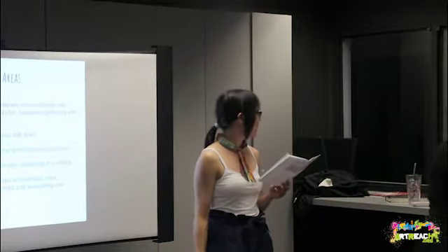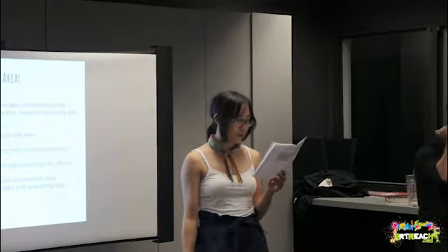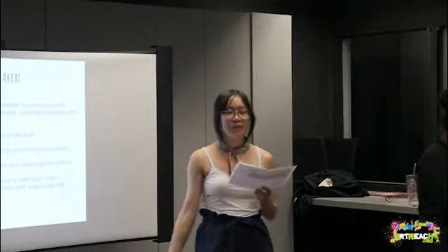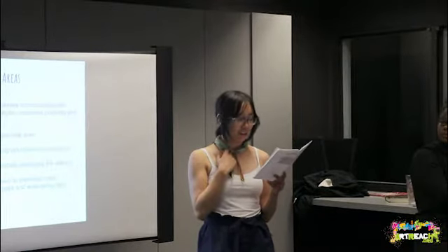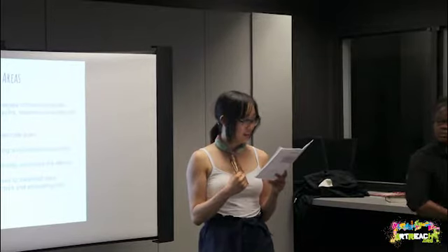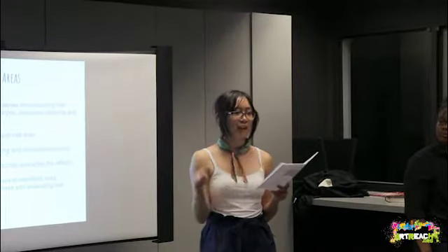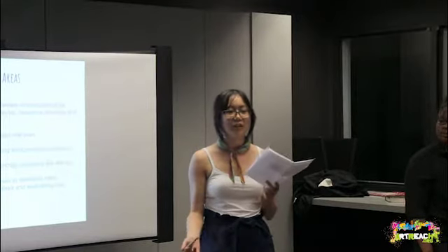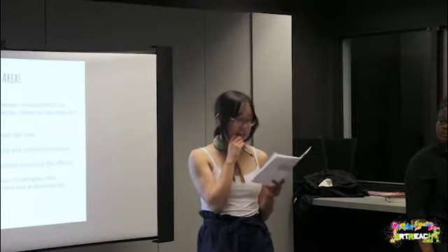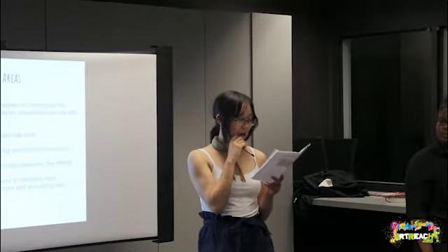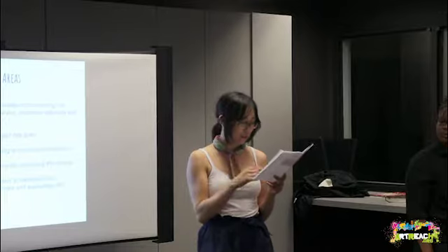Should I go to risk mitigation? Yes. So for low registration, because we're doing it with a partner, they share some of the risks. It's in their best interest to promote the program as hard as we are, because they get a cut of the money. So we're sharing the risk in that way. That's risk sharing, and then risk reduction. We're trying to learn from the mistakes of last year, so we want to do a better survey of parents as to why they signed their kids up, and were there any barriers. That was our highest risk of the ones we came up with.